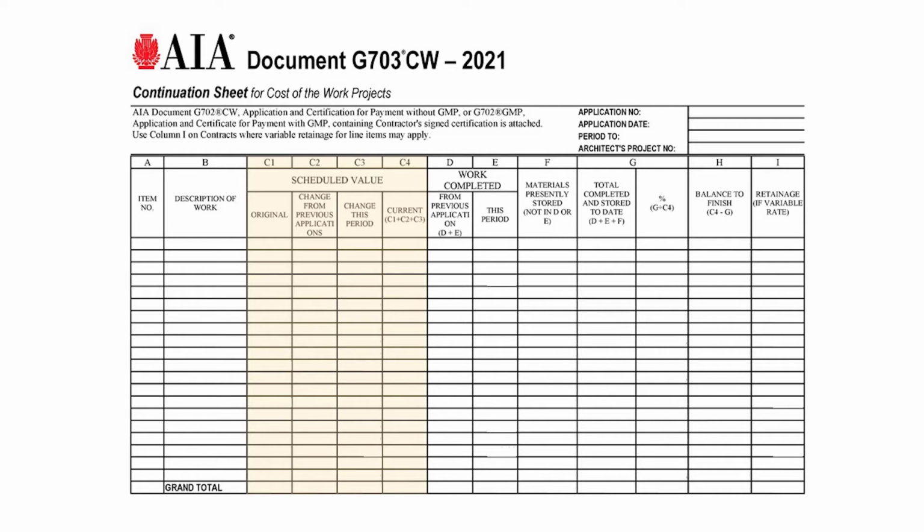So this was to try and educate architects without looking at, as Robin talked about, the controlled estimate when there is no guaranteed maximum price, and against the original guaranteed max price that was submitted for the architect or the owner to approve before they started construction. So these line items or columns were there to educate the architect and make it easier to understand what is being requested and what percentage is complete compared to what he or she observes in the field, and also to allow the owner to understand the estimated cost, the original estimated cost, and then the actual cost of each scope of work or line item on the application for payment.